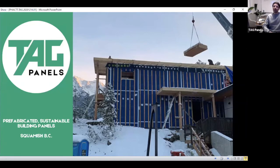Again, we got a lot of complex ones straight up. This required us to do all the glue line because of the architectural design. A lot of the roof and the panels were supported on an exoskeleton of glue lines. So when you talk about that overlap between who's doing what, we had to take on that role because we had to ensure that we got all the glue lines CNC'd so they would be exact, and then they would be installed by our crew to then allow other panels on.